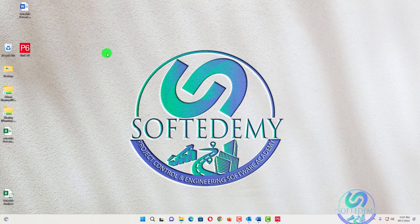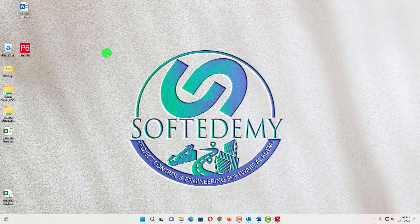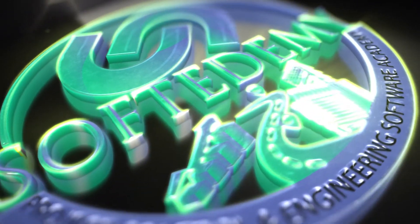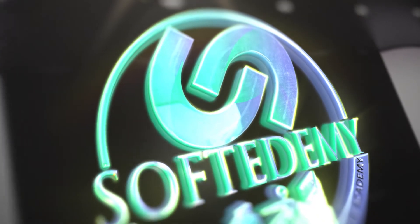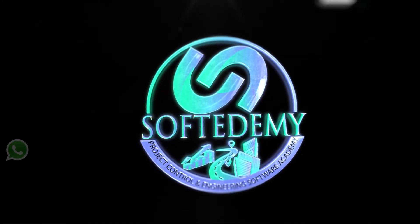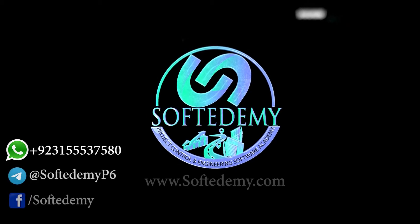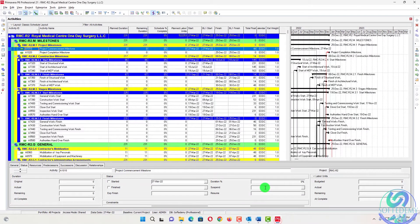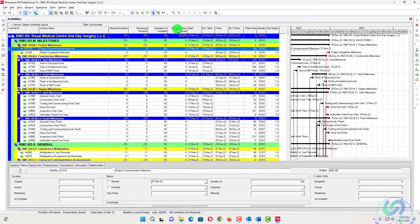So what is the theory behind that, and what formula will we require to calculate it in Excel? Can we use that manually in our monitoring reports? In Primavera P6 you can see the schedule percent complete column — it's also used as planned percent complete. In an S-curve, the planned percent is based on schedule percent complete.